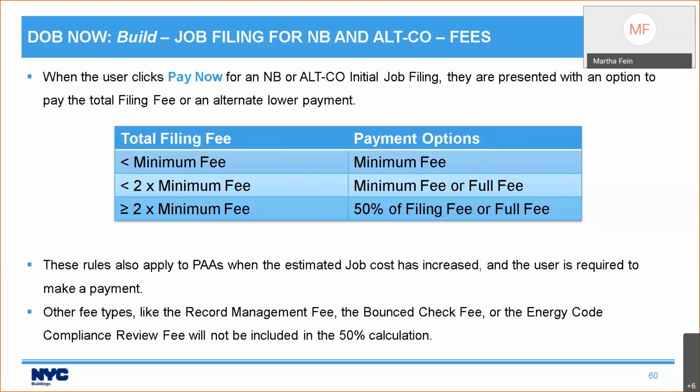Other fee types, like the record management fee, the bounce check fee, or the energy code compliance review fee, will not be included in the 50% calculation. I'm going to show this to you in a minute, but this applies only to initial job filings.